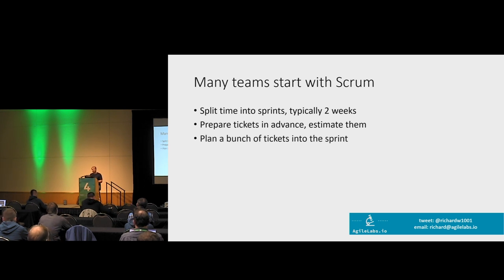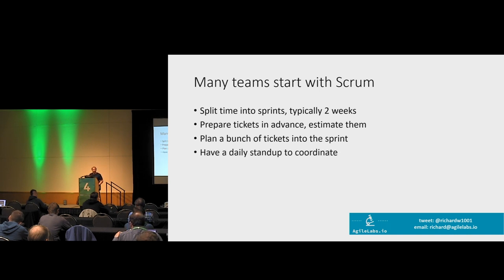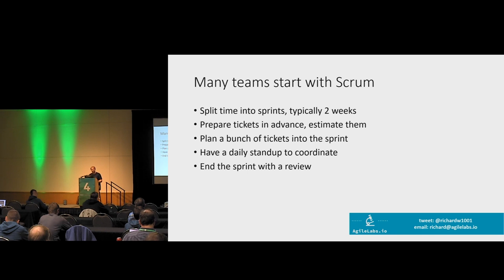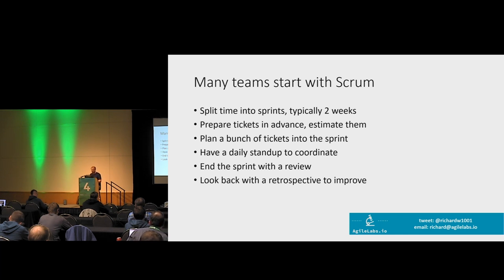Once you know how much you can fit into the sprint, you talk about priority — which ones you want to fit in, the most important things. Then every day the team has a stand-up, a meeting where you stand up to make it take less time, and you talk about what's going on with the work. At the end of the sprint, you look back on how you did, and then have a retrospective where you loop back and try to improve.